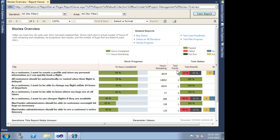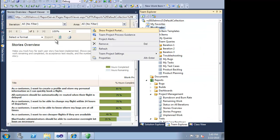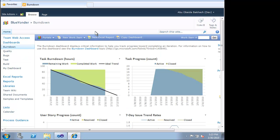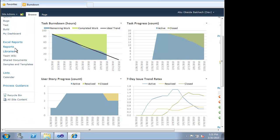For a broader view of the project, we can go to the project portal. The Burndown Dashboard helps us determine our progress towards finishing an iteration. We can see from the chart on the left that we are progressively completing our tasks, so we are making good progress. On a broader scale, we can see that our user stories are starting to get resolved as well. That's a good sign.